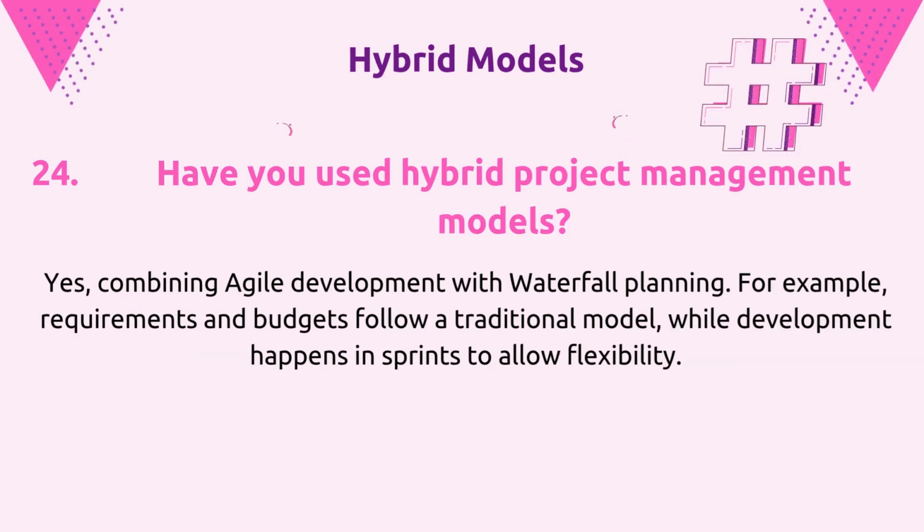Question 24 related to hybrid models. Have you used hybrid project management models? Yes, combining agile development with waterfall planning. For example, requirements and budgets follow a traditional model, while development happens in sprints to allow flexibility.